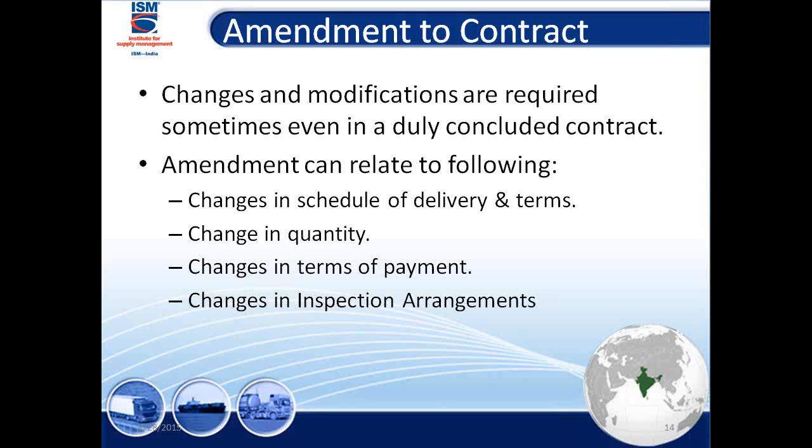Initially the supplier will agree, but later on, when the guy has done half the job, he knows very well you are in his hands. Then they will dictate to you: sorry sir, if you don't give me money, I can't buy the raw material, the work will get stuck. And they know very well that after half the job is done, we are not going to leave the supplier. So the supplier will come and try to force you to change the terms of payments.